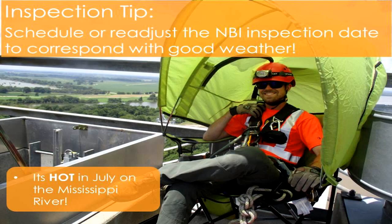Another thing, this is one of my favorite pictures. This is Don Cressman, one of our inspectors, just loving it at the top of the towers. We had to have somebody sit at the top of the towers to monitor our anchors and use the rope winches, and just for safety and rope access safety, we had somebody up there. Well, I've already told you, it was hot up there, right? We asked the client, why are we doing an in-depth inspection of this bridge in the middle of July? It was brutal hot. The client actually agreed that the next time they would do this in-depth inspection, they were going to move it back into May, where it's a little cooler.